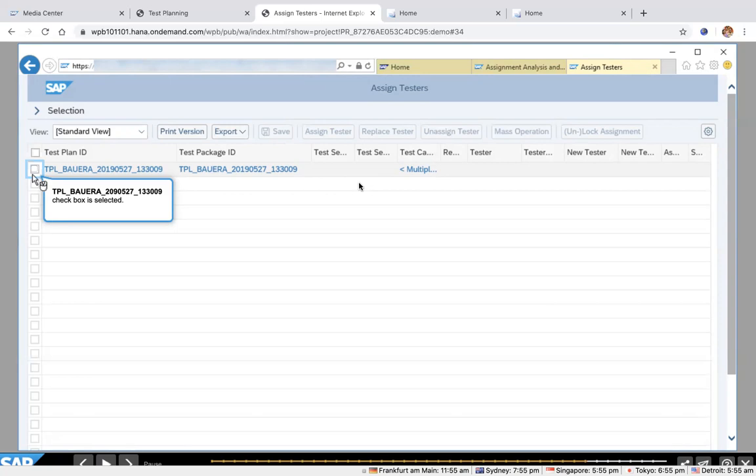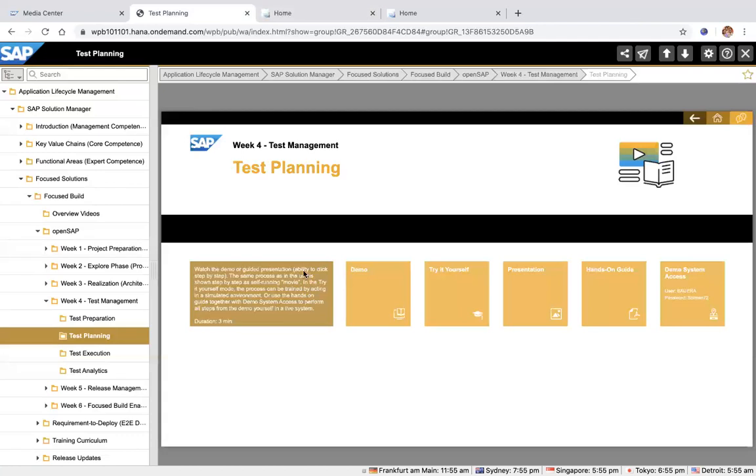whether it is integration testing or UAT testing. You can also do that manually, which means that you can directly go to test plan management in Solution Manager Test Suite and create a test plan on your own. Then you can select the test cases directly by looking at the solution documentation. The only thing is that then you have to come back here for traceability purposes. You have to come back into this view and then assign the test plan manually, right? So that you have to do manually. Otherwise, you could also create test plans outside of this app that I just showed.